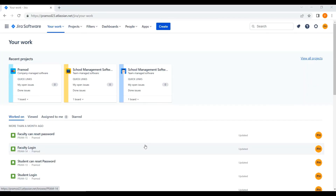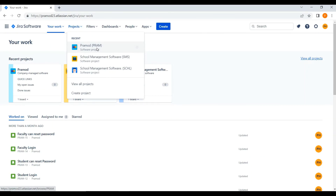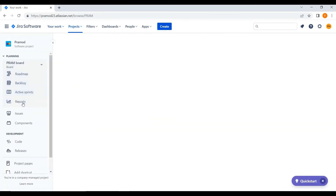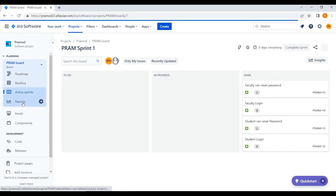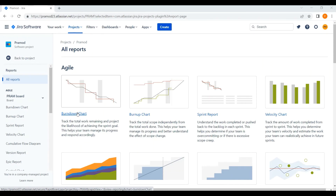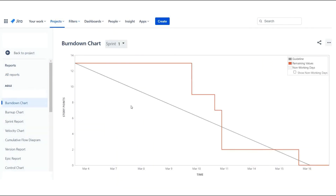I will also show you where to check the sprint burndown chart in Jira. In the Jira tool, click on the Projects dropdown and select your project name. Click on Reports from the left-hand navigation, then click on Burndown Chart. This is the sprint burndown chart. You can also select the specific sprint from the dropdown for which you wish to see the chart. The chart varies for each sprint depending on team performance.